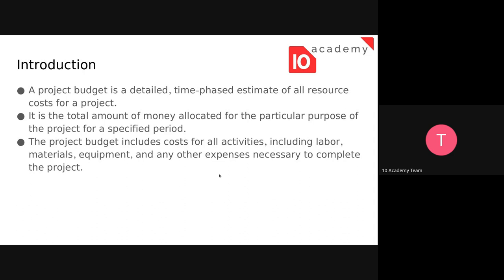A project budget is a detailed time-phase estimate of all the resource costs for a project. It's the total amount of money allocated for that project from the beginning up to the end. It includes lots of costs needed for different activities — labor, materials, experiments, and other expenses necessary to complete the project. You also need to include a backup or contingency fund.